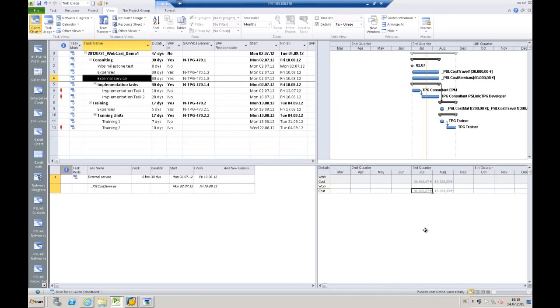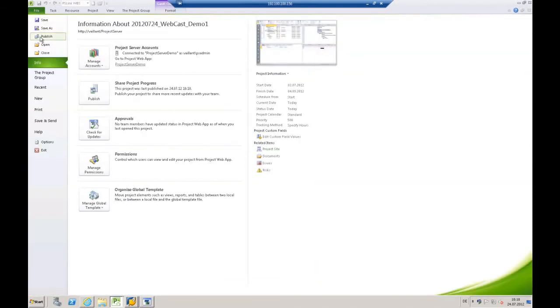Whatever you do for planning in your system is something that we need later on to provide as a forecast to the finance system as well. So for example, you have 40,000 for July and maybe only 5,000 for August, whatever, or 50,000. Yeah, let's leave it with 50,000 for August. So I will save this again and publish this information.